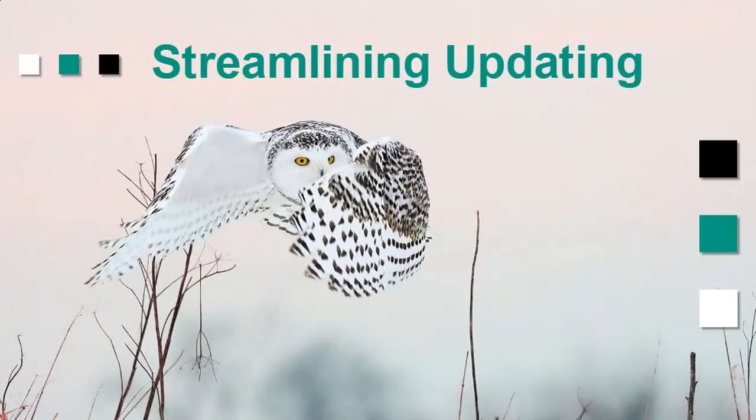Updating is another thing that we found Calculator can really be good for, because you get some values in, and then again, we can do calculations. We had some groups that wanted to understand their overhead and their profit off of the basic costs incurred. So we calculated those things automatically off percentages, and the percentages were not the same on all the activities. That's another thing you could do, and it can give you your forecasting very, very quickly.